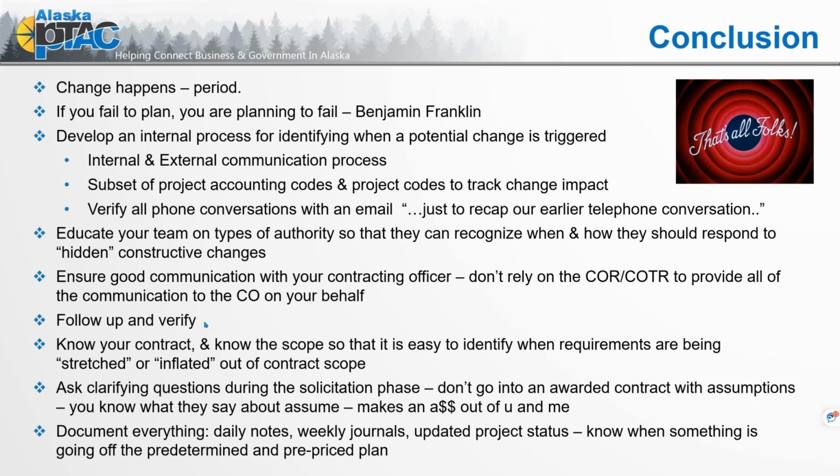But again, it's really easy for vague or obtuse language in a scope of work. If your language says, we'll provide reports on, does those reports include modifications and revisions and final reports and review it again, then more requests, more. Make sure that you don't have that ambiguous language in your contract where it's easy for the contracting officer to come back and say, no, that isn't a change, that's clearly in the contract. Clarify that during the solicitation phase.